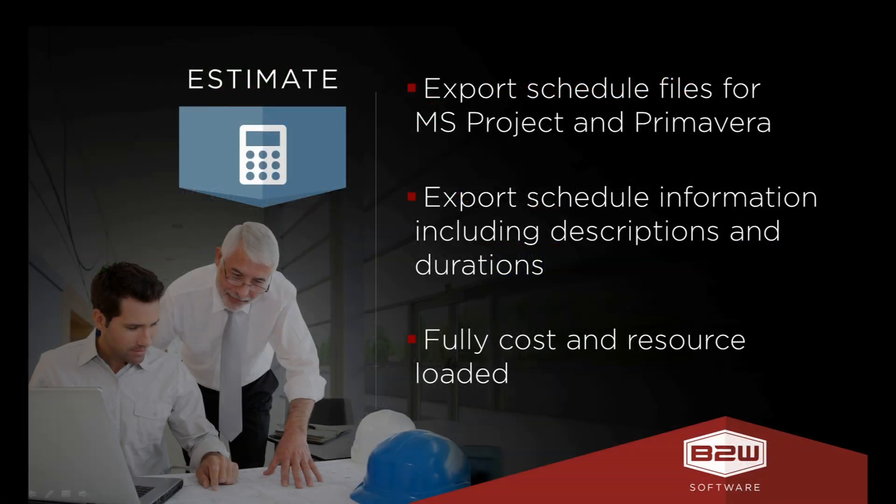B2W Estimate allows you to export a file from Microsoft Project or Primavera. The file creates a schedule with all descriptions and durations, and it's fully cost loaded and fully resource loaded.